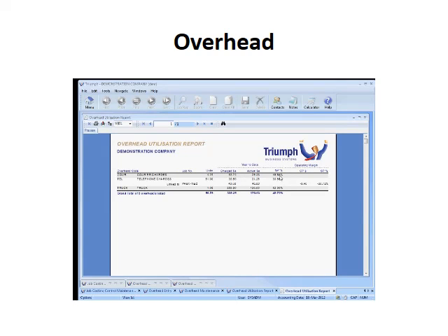What was my GP? You'll see on the telephone charges it has that information, but it also then links to the PABX job to say this is what was charged and what the real costs on running that job. So you can actually run an asset and track all the individual costs of running that asset. So if it was a truck, it could be the tyres, the fuel, all those things going to it. And then you can see how much was actually charged out to other jobs through the overhead recharging.